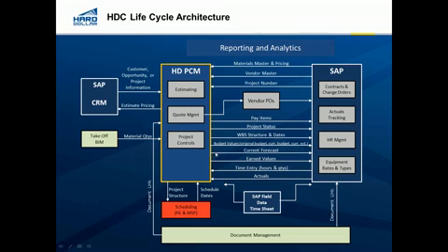The forecast is really coming, this is a little bit out of order because I've got actuals coming back down here. The forecast is actually calculated from time entry hours that are being sent over from SAP into HardDollar to generate that current forecast, along with the actuals that are being entered into HardDollar and earned value. So HardDollar has the concept of earned actuals against the work that's actually been performed.